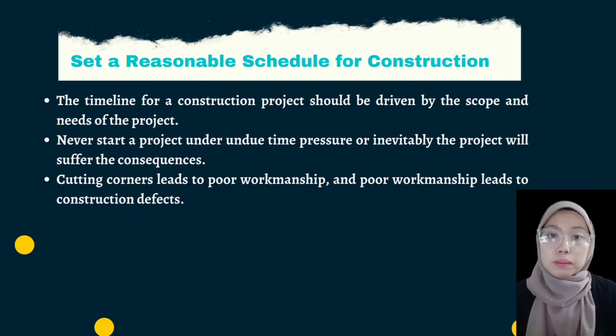Shop drawings will be promptly reviewed, and unexpected conditions or changes will be fairly compensated. Where these expectations are not met, delays inevitably occur. To ensure success, all project participants should have reasonable expectations and know that some element of delay must be tolerated.